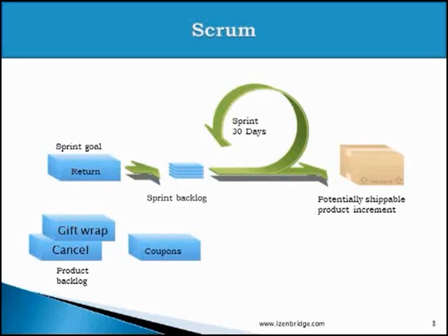During the sprint, the product owner along with the team keeps grooming the product backlog. So you might have seen a new requirement or a story coming in and getting added to the product backlog. While the team is working on selected product backlog items for the current sprint, the product owner is grooming the product backlog items in parallel.